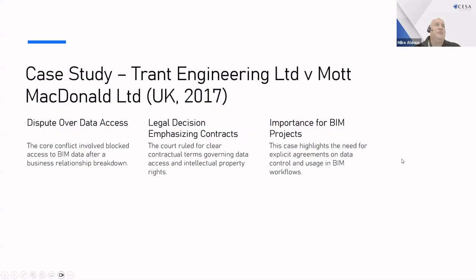So if we look at the first case study that we've pulled out, this was probably one of the first and most seminal legal cases to be tested in the UK in 2017, between Trent Engineering and Mott MacDonald. The dispute was over data access. The core conflict involved blocked access to data after a business relationship breakdown.